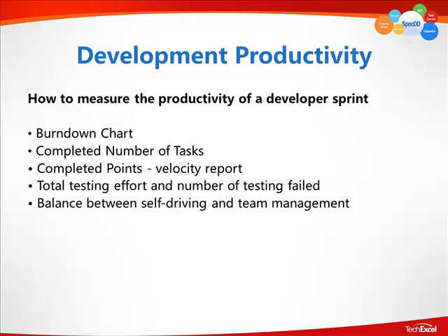You also have your total testing effort and the number of testing failed. Now this is not the QA testing. This is the developer's own unit testing. So the time that they spent to test after they write their code and to see if anything fails, a developer needs to keep track of that. And if it's the developer that's doing it, then that is something that will be measured because it is part of the developer's productivity.